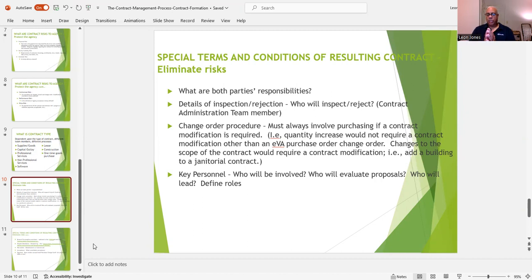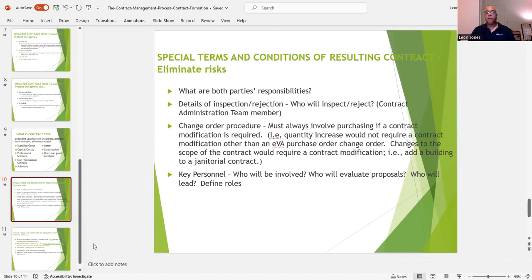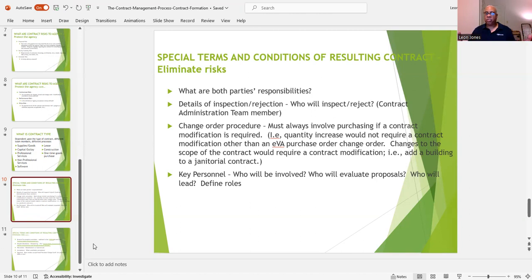A quantity increase, depending on the percentage over — this is where you get into your specifications. If you have an overrun on an item and it's 10% over the original quantity, you don't need a change order — but only if the specifications spell it out. You can find all this information in what we call your general or 100 specifications, which tell you about payments, the contract, specifications, liquidated damages, and processing payments.